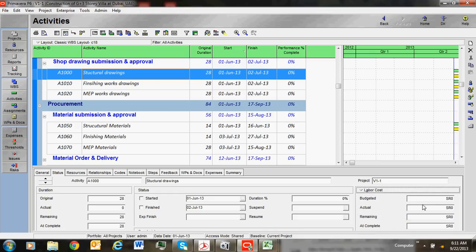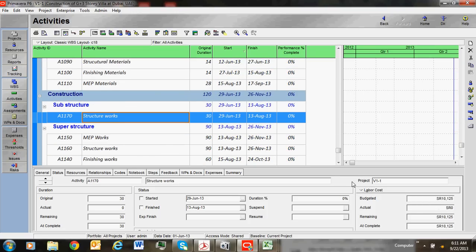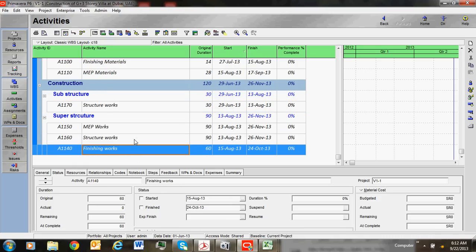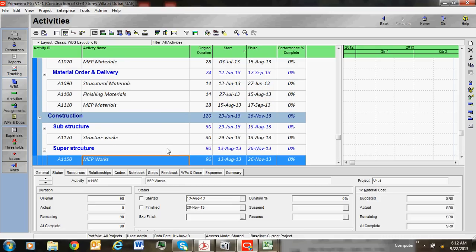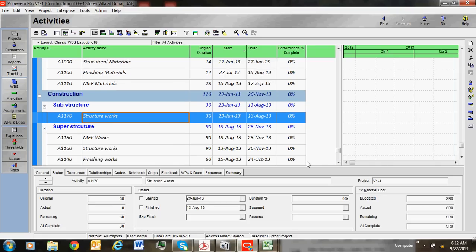If you know the exact cost for labor to assign to activities like structural drawings or construction activities, the labor cost is here, non-labor cost is here, and material cost is here. If it wasn't assigned, and if you are clear about this cost and you have a Bill of Quantities (BOQ), you can extract data and get input from the BOQ for all projects.